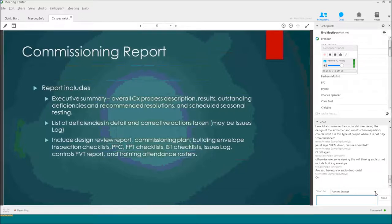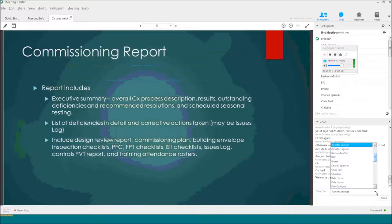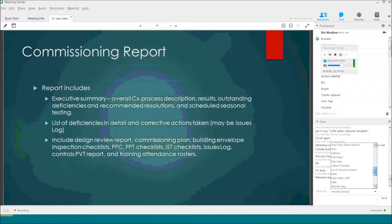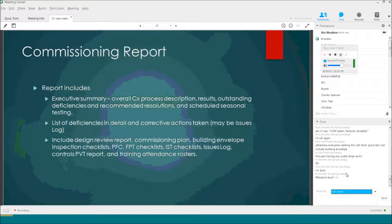The commissioning report includes an executive summary describing how everything went, any outstanding issues or deficiencies, and any activities still outstanding. You'll get this report soon after all the problems found in functional performance testing or integrated systems testing have been corrected. It'll list anything that's still yet to be done, such as seasonal testing and post-construction performance monitoring. It also includes a lot of the documentation generated along the way — design review reports, commissioning plans, checklists, issues logs, and so forth — rolled up into a single submittal that can be handed to the users to help them maintain and operate the facility, and maintained so we can find it all in one spot if we have problems later.